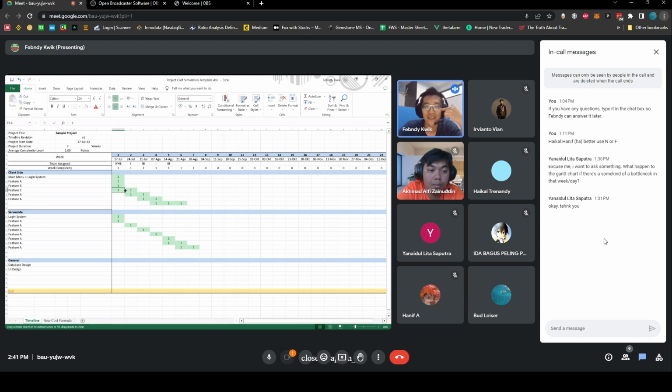See, this is a carryover, meaning I'm going to be assuming that these three are going to be done, but this one's not going to be done, and then I'm going to be carrying this over to the next week. So this week, if I want to go crazy again, I can only do three. Or if I do four like this, it's actually three and a half, something like that.